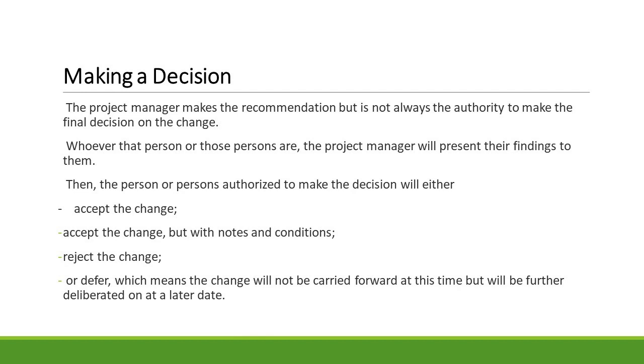The project manager makes the recommendation but is not always the authority to make the final decision on the change. Whoever that person or those persons are, the project manager will present their findings to them. Then, the person or persons authorized to make the decision will either accept the change, but with notes and conditions, reject the change, or defer, which means the change will not be carried forward at this time but will be further deliberated on later.